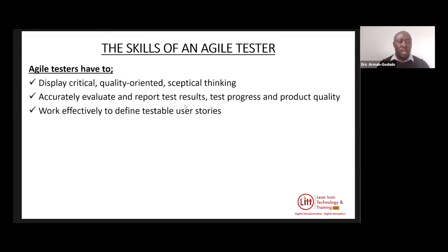So you work effectively to define testable user stories. Work with the BA and the rest of the team. Work effectively to define acceptance criteria as well. So BAs, you want to engage your testers. It's always a good thing to engage testers.